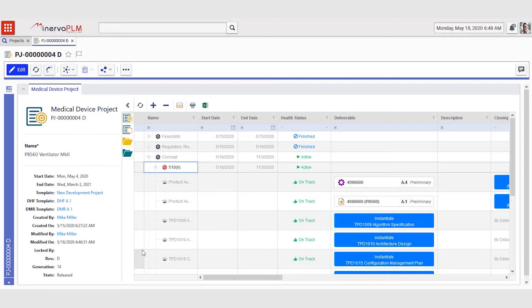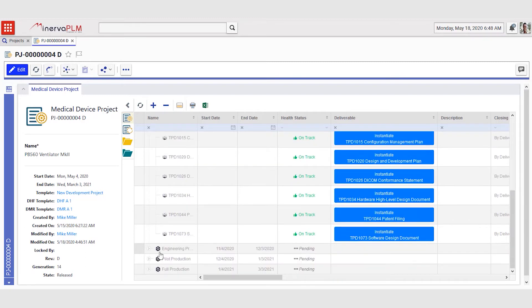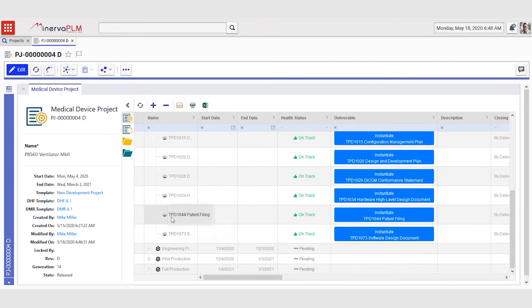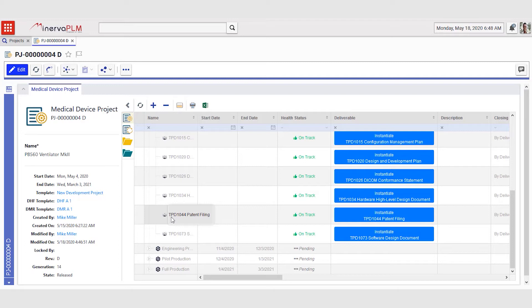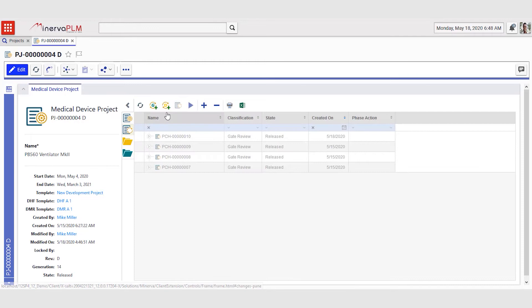Mike and his team is working very hard to complete the ventilator project but during the concept phase they realize that they will not be able to complete the patent filing within the concept phase and they wish to move that to the next phase which is engineering prototype. In order to do such a change in Minerva PLM, there is a need to do a change order called design change.